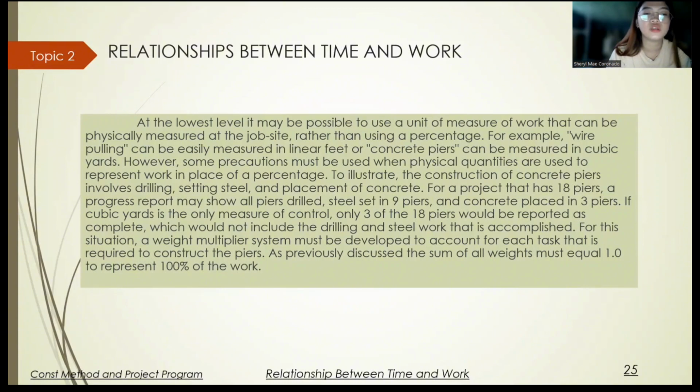For this situation, a weight multiplier system must be developed to account for each task that is required to construct the piers. As previously discussed, the sum of all weights must equal 1 to represent 100% of the work.